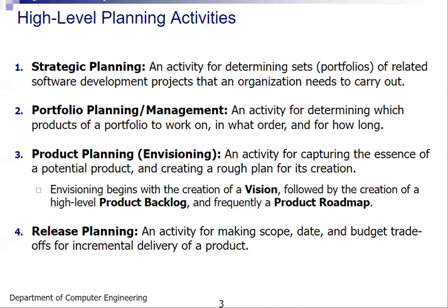Next, product planning. So now, if you have decided that you will be starting with product A, then your team needs to work on product A. Then envisioning is something you have to do, like you have to decide the vision of that product development. You need to create a product backlog and the product roadmap you are supposed to create. So that will happen in the product planning, an activity for capturing the essence of a potential product and creating a rough plan for its creation.